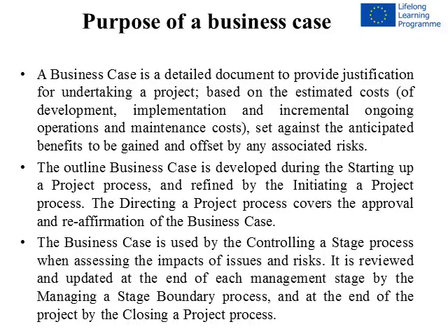The business case is used by the controlling a stage process when assessing the impacts of issues and risks. It is reviewed and updated at the end of each management stage by the managing a stage boundary process, and at the end of the project by the closing a project process.